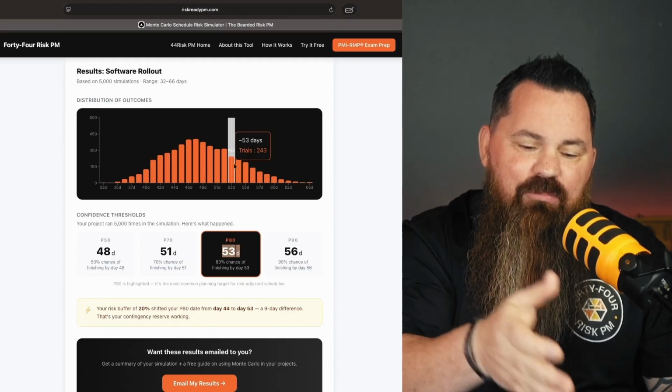It has an 80% confidence behind it. So what do you do with all of this information? Monte Carlo, the main goal is to answer 3 questions that every project manager gets asked. First, what is our realistic finish date? Not the optimistic, not the worst case. What our stakeholders want to see is that 70 or 80% solution. That should be your answer.